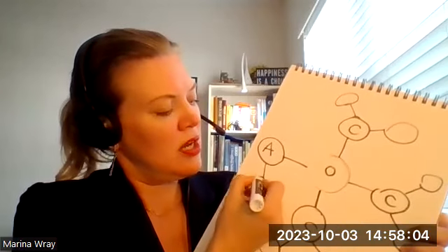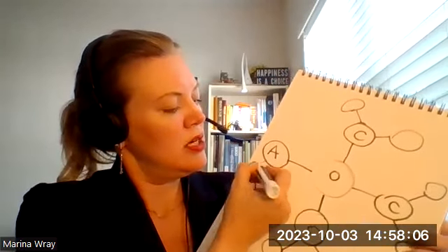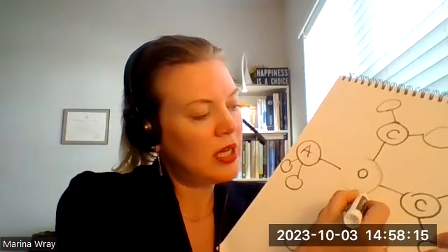An architect can have their consultants and their designers that they work together with. The owner can also have their own suppliers, so we write it down here. For example, if the owner has a preferred equipment or manufacturer or some tile that they work directly with, they can say, hey, we're not going to include that in the construction cost.